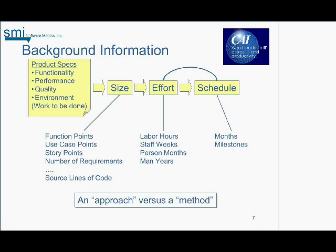The important thing about effort is you need to understand what the units are when you do your size estimation. For parametric models, you may get effort in different units than you're used to. If the effort is fixed — say there are 10 people on the project, that's all there is — then size goes right through effort into schedule and schedule varies according to size. There's a feedback loop from schedule back to effort: if you compress the schedule, it's going to take more people to actually do the effort. That compression is best taken care of in models. Whenever you shorten the time frame, you're going to have to work longer hours or have more people.